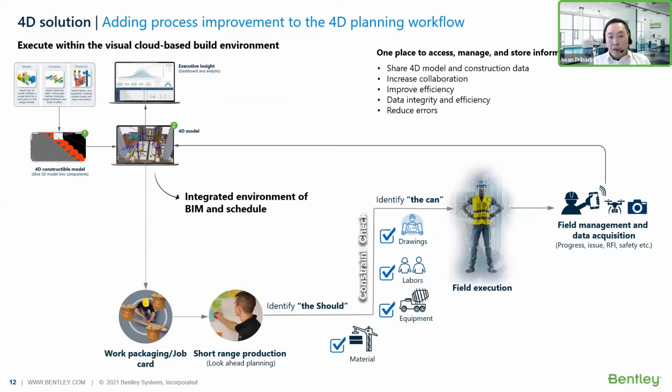If you're just doing traditional 4D planning, you identify your look-ahead planning as what should I do for the next 4 weeks. Now, among that pool of activities that you try to do, you would start checking whether those activities are really viable for you to actually deliver in the field, right? So this process is quite important and now gaining popularity among our users.